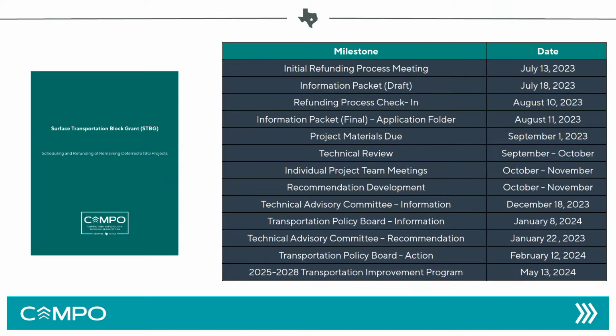I'm meeting with TxDOT and our GEC next week to go through the results of that review, and then we're also going to be meeting with the project sponsors to go through the materials as well. That item is going to be coming back early next year. We plan on having a recommendation developed for this body to take action on sometime next year, and then depending on the outcomes of those actions, we'll be including those in the next iteration of the Transportation Improvement Program, which runs from fiscal year 2025 to 2028.